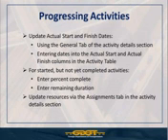So you will be able to see what the baseline duration of an activity is. That will be locked in place. But if you only had 30 days budgeted for that task, and you say you worked 15 days already on it, and you still have another 40 days left to work on it, you'll see that reflected in your current schedule, right? What we usually call in Primavera your current schedule, and you can see the comparison against your baseline schedule as well. Does that answer your question?